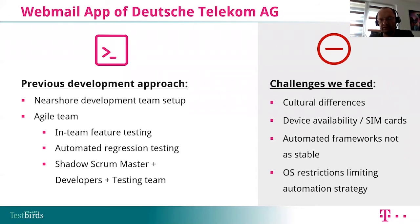But on the more professional side, we also had to deal with trivial aspects like device availability. This is a bit complicated due to our own company processes for getting these devices. It could take up to 8 weeks to get a brand new device. And if your management really wants to feature, for instance, the latest Google device, it is a bit cumbersome if you have to wait 8 weeks till the device hits your office, and then you still need to hand it over to the colleagues in Romania. So I would say between 8 and 10 weeks till we get new devices was not an exception.